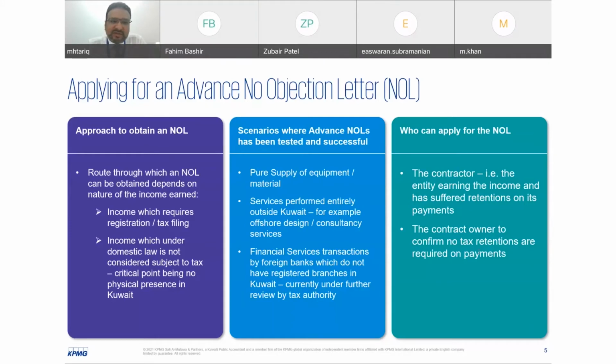Normally it takes 4 to 6 weeks maximum to apply, but we have to consider that because of the pandemic situation, COVID-19, and government restrictions, companies and especially tax authorities are not operating with full manpower. So we can say that another week or two can be added, but normally 4 to 6 weeks is enough to submit all the documentation.